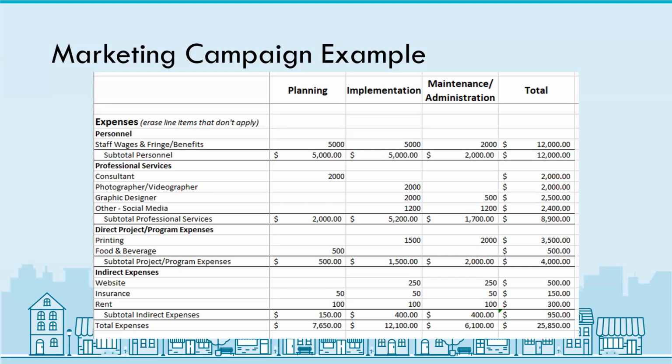And in the maintenance phase of the project, we want to keep this ongoing, not just a one-time thing. So we're going to leave in money for a graphic designer and a social media manager, and there are some other costs associated. One of the biggest mistakes people make is focusing only on upfront costs. But what happens when the ads stop running or the website needs an update? Thinking about long-term maintenance keeps your project going strong instead of fizzling out.